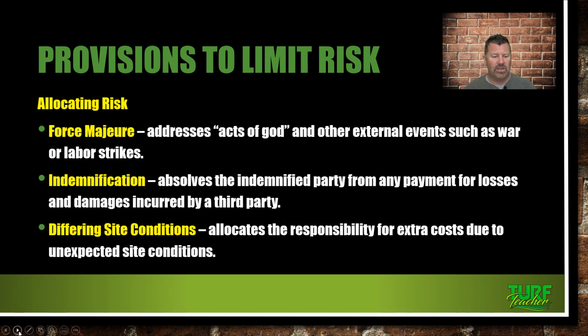Allocating risk. A force majeure addresses acts of God and other external events such as war or labor strikes. Wow. Hopefully we don't have to deal with any of that, but I could see, like, acts of God. You install a landscape and a tornado comes through, destroys the building, destroys the landscape, all of it. Indemnification absolves the identified party from any payment for losses and damages incurred by a third party. And then differing site conditions, allocation of responsibility for extra costs due to unexpected site conditions.